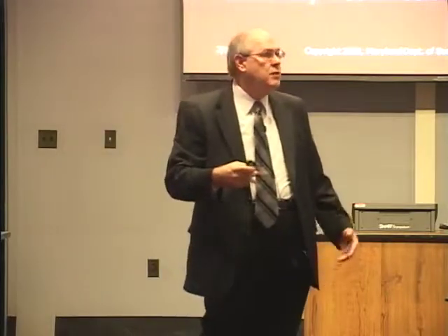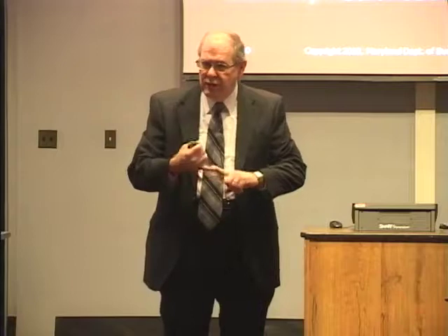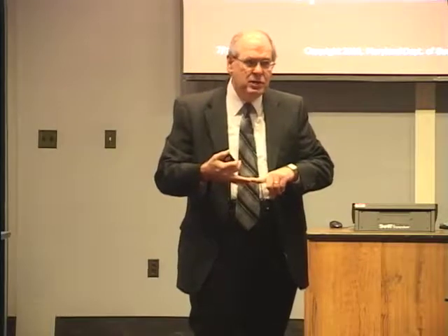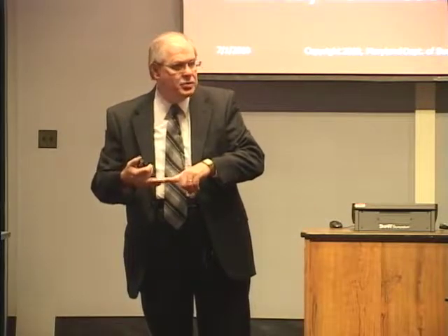So you have the issue of, number one, finding out about it. And we have language typically in our contracts that says there must be notice given X number of days before an occurrence of a cancellation of a bond or insurance so that we have some time to try to do something about it. And usually we have requirements that the vendor must come in with a new policy, a new bond within so many days of notice of the cancellation or non-renewal. And the issue is, number one, finding out about it, and number two, holding the vendor's feet to the fire so that if there is a problem with insurance or bonding, they go out and aggressively try to get a replacement policy.